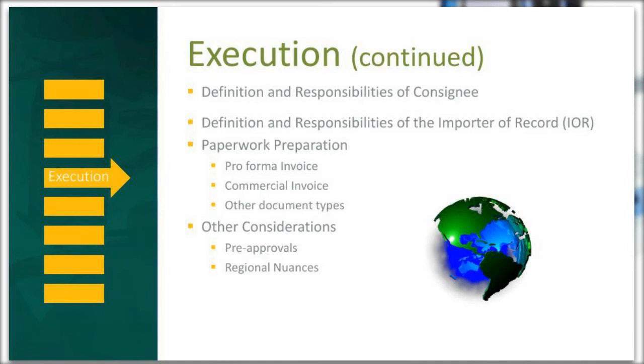Other additional documents needed for your ancillary supplies may require the certificate of analysis, or a certificate of conformity, or possibly a country of origin certificate. Such documents will be required prior to customs clearance to support the detailed information required by country customs. Dan, didn't you have some other examples of some specific documents associated with ancillary supplies?